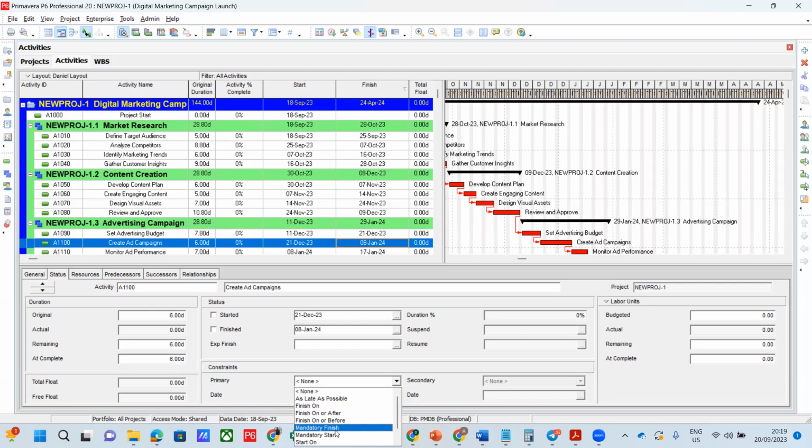If I told you I need to roof a house, and even though you would have finished the structure and everything by the 20th of October, the roofing sheet won't be delivered until the 1st of November, and you can't do anything without a roofing sheet, you need to wait for it. That creates some float for you.